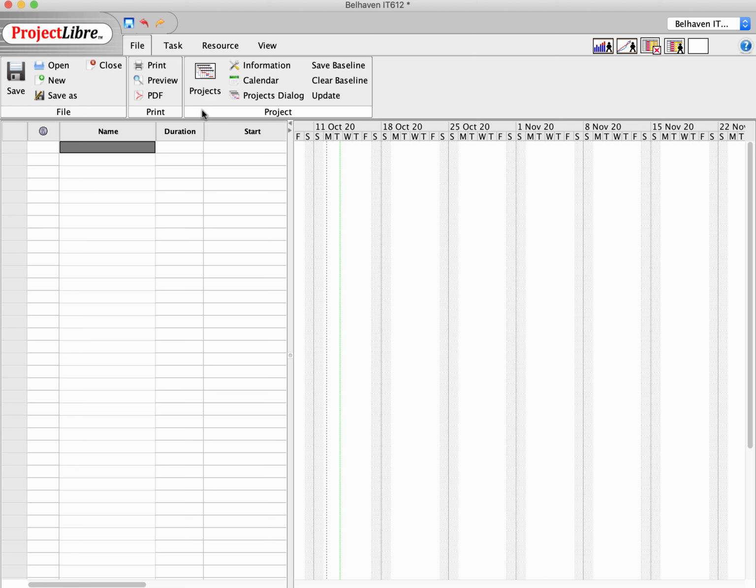So, and I'll just name a couple of them here. As an example, baseline. What does that mean? Well, when you're developing a project in software like this, you would usually develop a plan first before you ever started working on the project. You'll create tasks that represent the work that needs to be done in a project. And at some point you want to save it as the plan. The reason is that you usually want to have an original of what the project should have looked like when everybody signed on and it started.